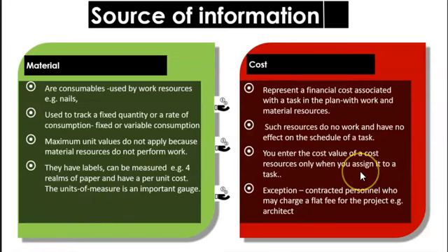So what am I saying? If you have allocated $10,000 for airfare, and that involves the effort of several people on the project, it's only as each trip is undertaken, and you have the cost of that trip, that it is assigned to the task.